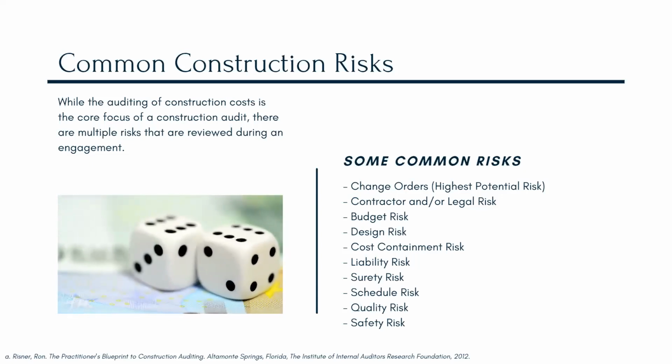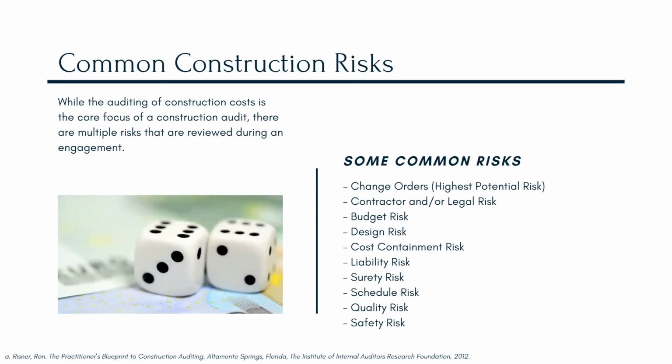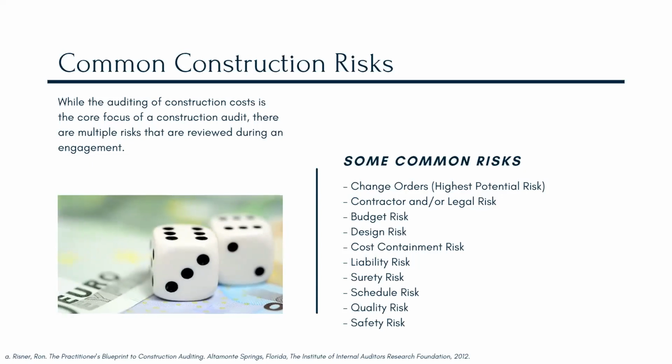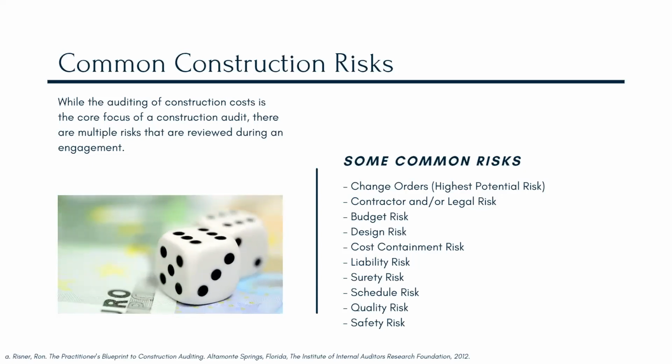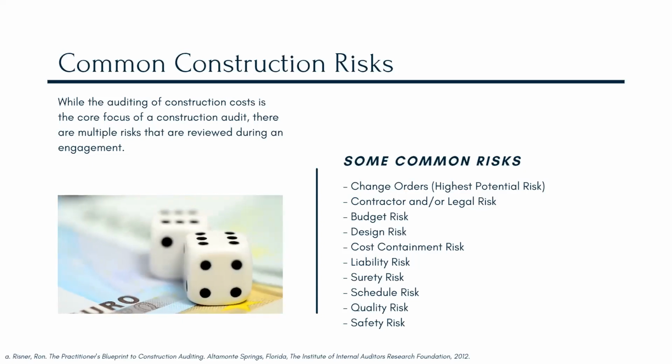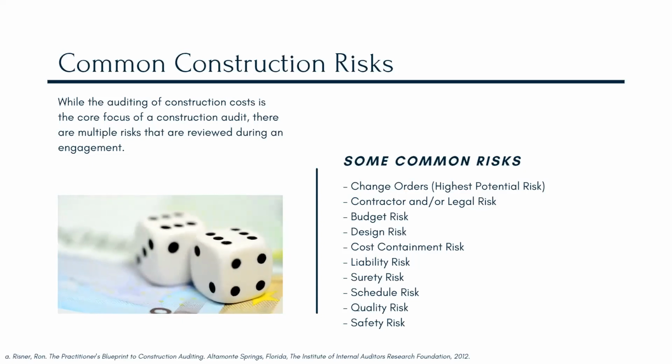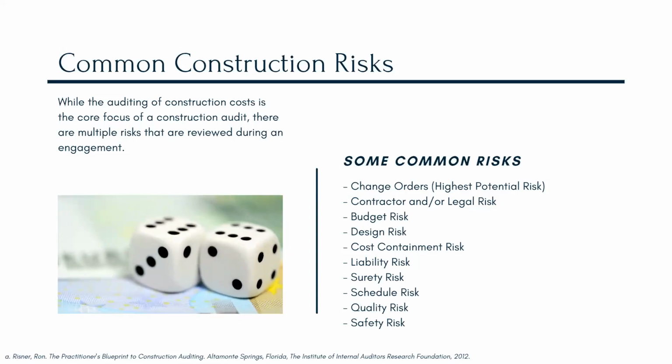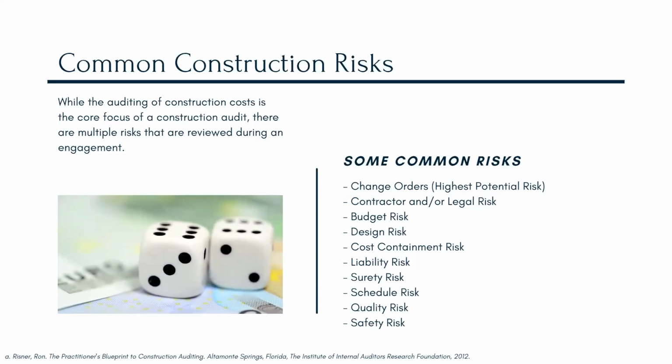If it's a prepay model, the solution is just don't pay the invoice. You don't pay the invoice, it'll get fixed, and another invoice will be submitted, or a pay application will be submitted that's been adjusted. And once it passes through the audit review and is approved, then it'll get paid.